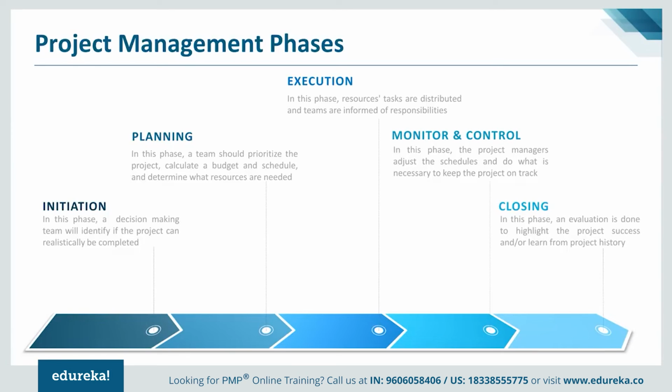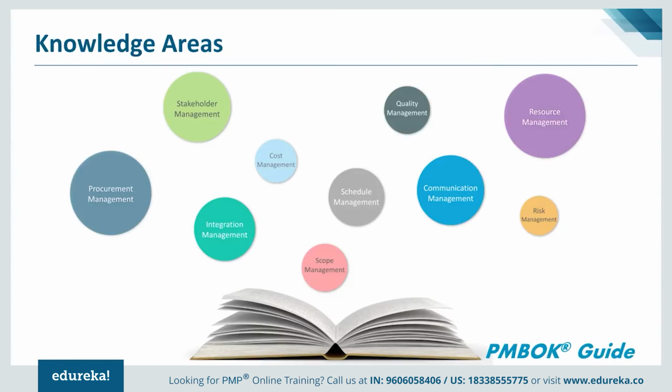Closing. So again, closing is another phase where what we do typically is that we close all the activities that we have been doing. So we do proper handover to the operations team and support team. At the same time, we ensure that vendor contracts, if there are any, are getting closed properly. If the team is there, then we ensure that the team activities, in terms of adjourning activities, are happening properly. So all those things will be a part of project closure typically. So these are nothing but the process groups, I would call them mainly initiation, planning, execution, monitoring and controlling, and closing.